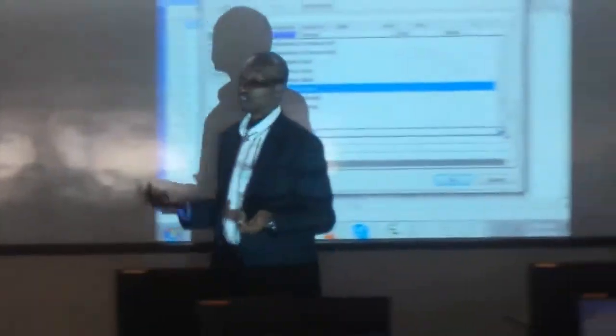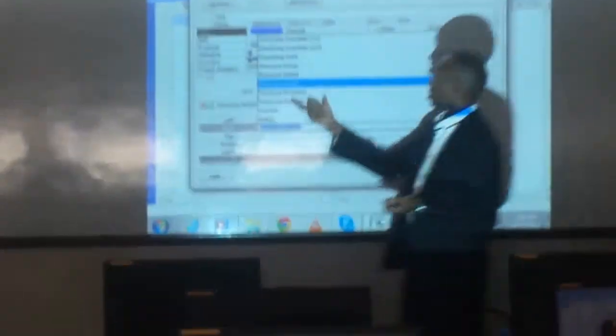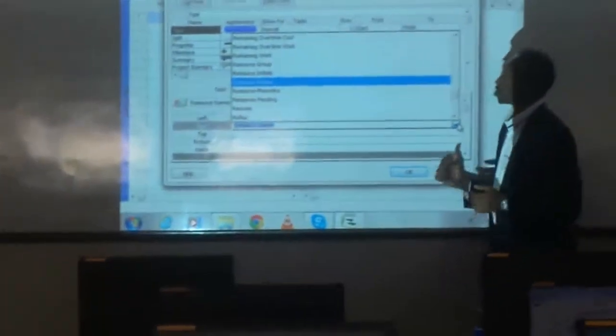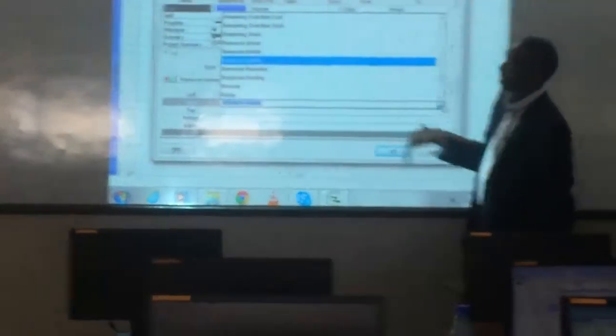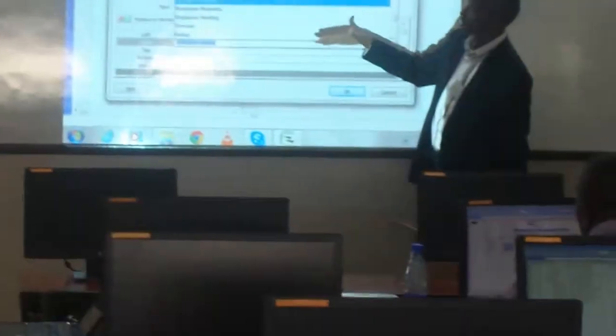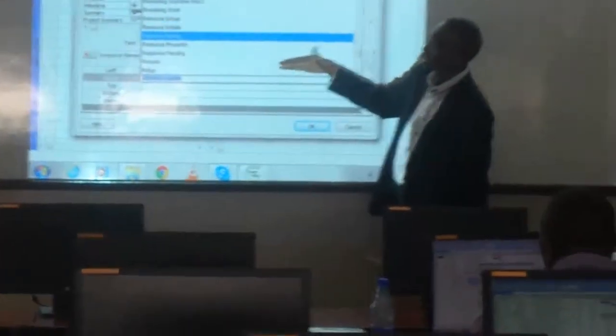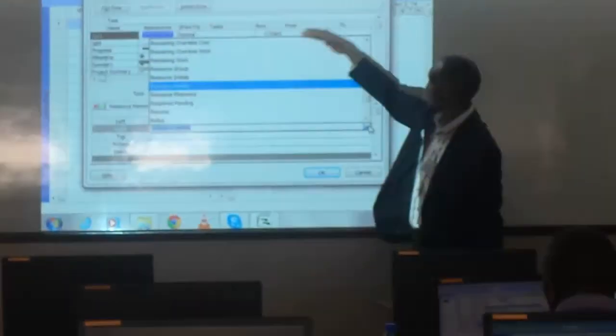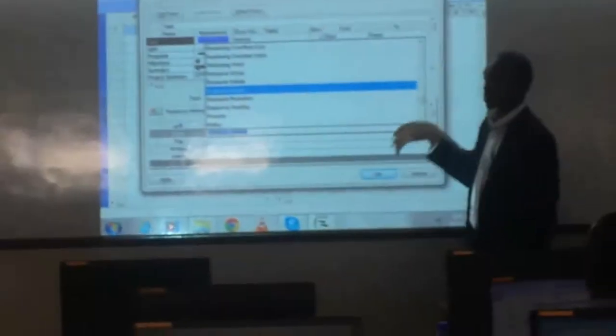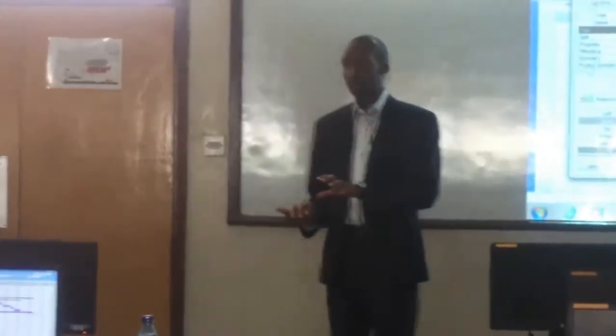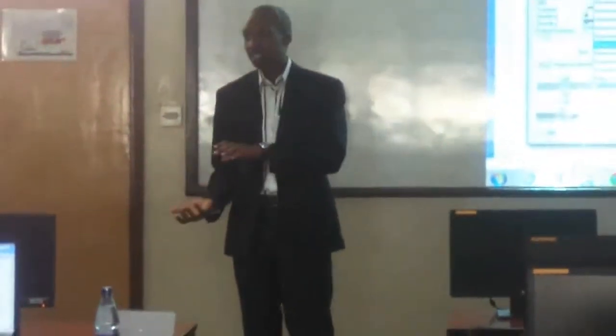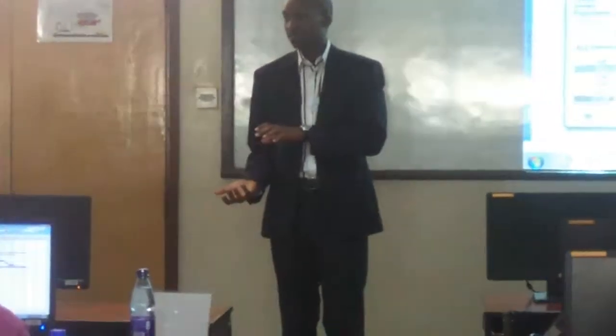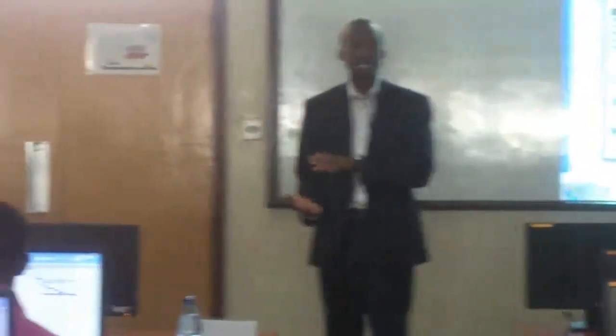Maybe you also want resource names to appear there. Resource names are the names of the people responsible for that task. You define them first, then you can allocate. When you allocate, which we are coming to today, they appear automatically. But sometimes they are hidden. If they are hidden, you come back and specify resource names.